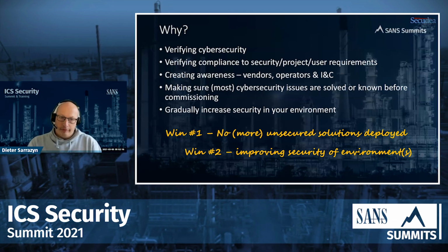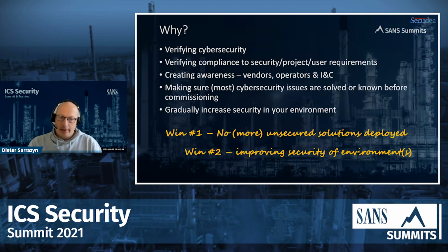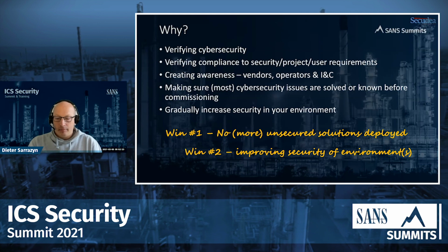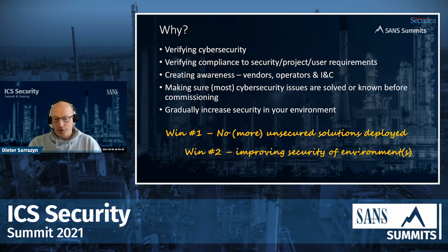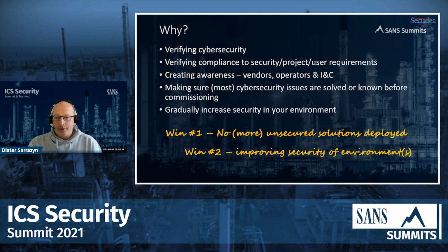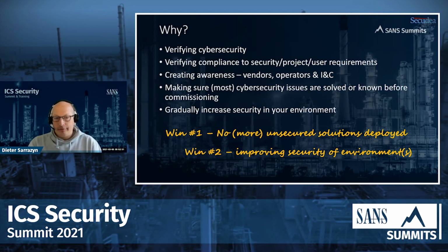Another important thing in FAT/SAT testing is that you have to have the cybersecurity issues. All the things that you discover should be solved. I said should, it's not always the case. At least they should be known before you go into commissioning phases.